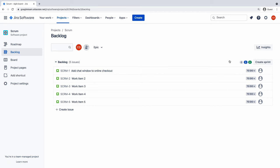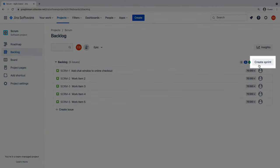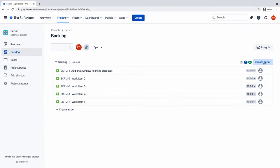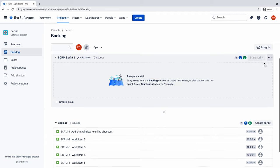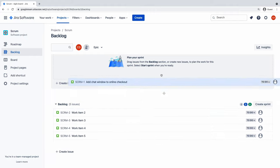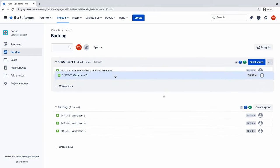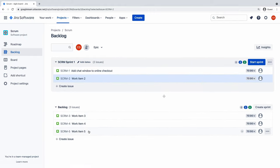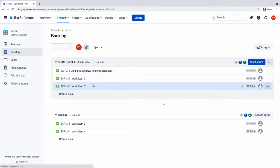Once you've added all the details about the work you have in the backlog, you are ready to create a sprint. A sprint is a short time box period when a Scrum team works to complete a set amount of work. Like the backlog, it is a hallmark feature of Scrum. Create your sprint and add all of the items you are aiming to accomplish in the predefined amount of time, usually two weeks.